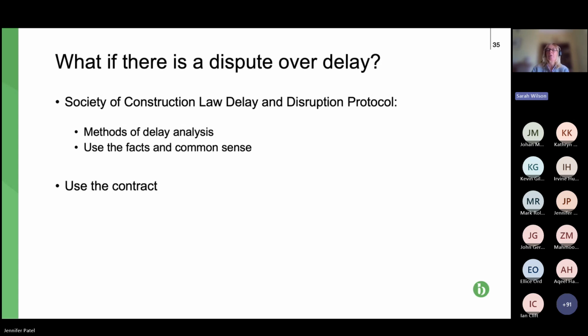So what? Yeah. So if there's a dispute over delay, we've talked about that in terms of programs. But also don't forget the Society of Construction Law, so the SCL, we've looked at this already, has a delay and disruption protocol, which is often useful, talks about the various methods of delay analysis. Obviously, with NEC, you'd have to take into account the Northern Ireland case and the prospective, retrospective issues that we've looked at.